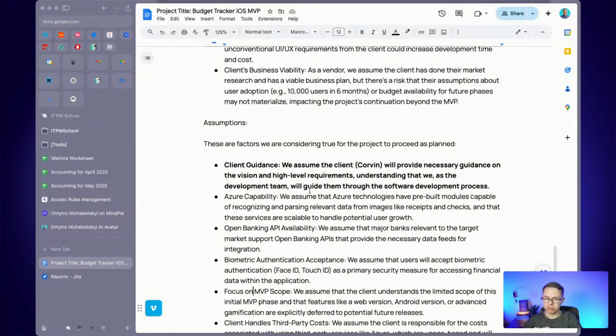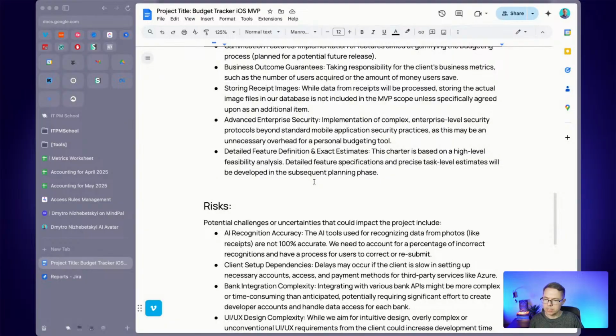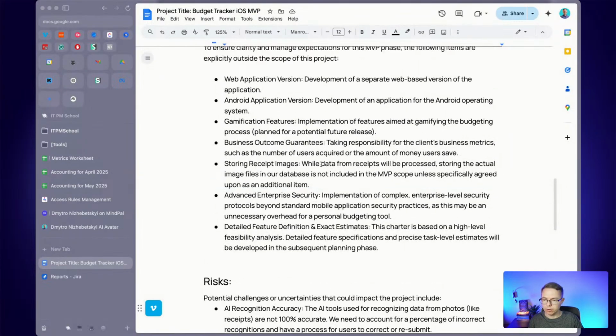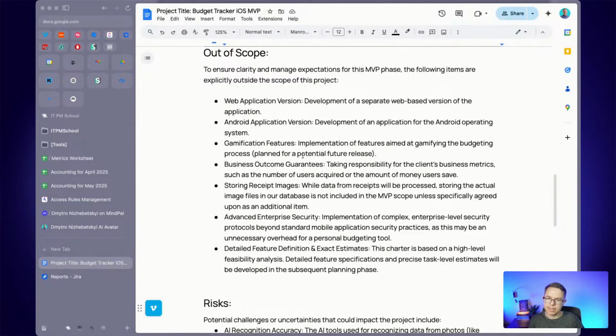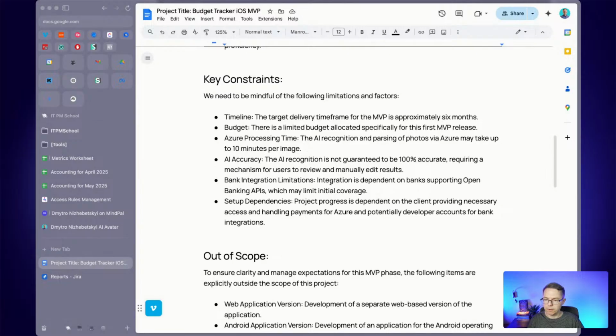Put the scope in your project management tool. Start acting upon assumptions. Use the project charter, assumptions, constraints, and risks as an engagement point to build expectations from your key stakeholders, from your customers, clients, and subject matter experts. Explicitly stating that you assume that people will participate in the project is critical here because they need to hear it. You assume that they know it, but they don't. Believe me, customers don't know how to manage projects, you know. So you must guide them through this process.